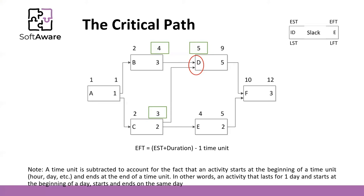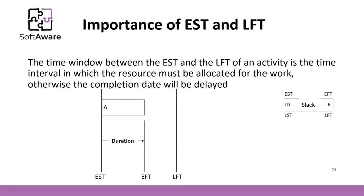Just to note that one time unit is subtracted to account for the fact that the activity starts at the beginning of a time unit — hour, day, and so on — and ends at the end of a time unit. In other words, an activity that lasts for one day and starts at the beginning of the day starts and ends on the same day. The time window between the earliest start time and the latest finish time is where the completion of the task must occur and the resources must be allocated. The difference between the latest finish time and the earliest finish time is the slack — the window within which you can slide the task.